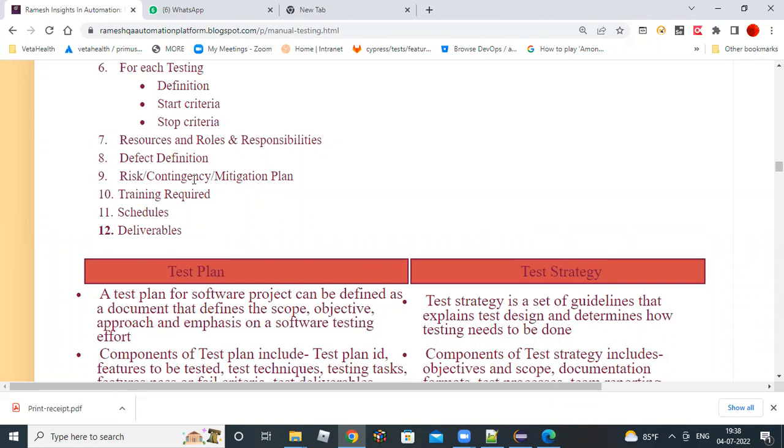The second risk I told you about is a team member not attending the office. The alternative is to either recruit one more resource or prepare a shadow resource. The shadow resource has already worked on it, so they can cope with the two works. Somehow you have to handle it until you get the new resource, so the existing resources should share the work. That's the kind of risk.